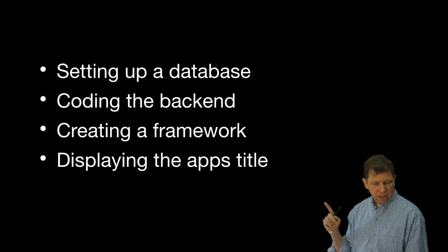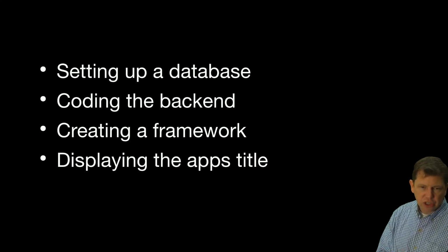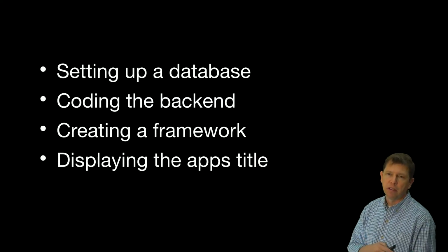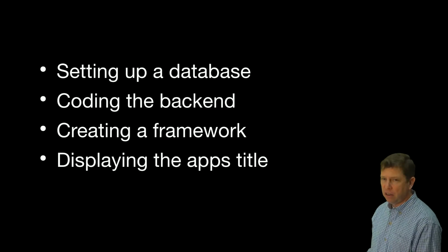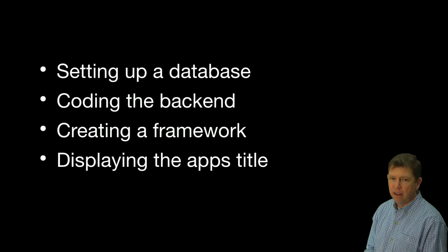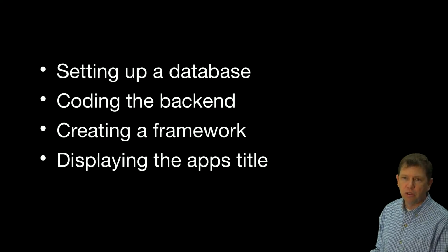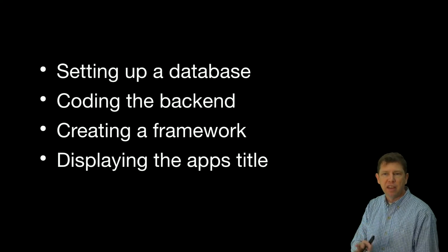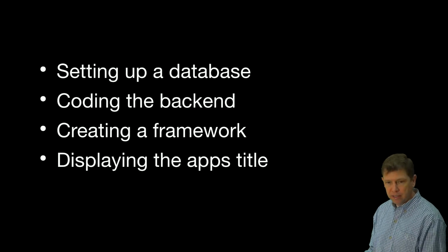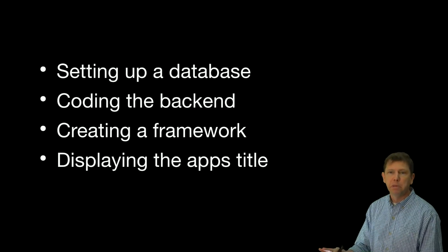I want you to look at these and think of which of these are actually going to be something that the user would perceive as progress. Setting up a database does not mean anything to the user. Coding the back end, if the user can't see it, doesn't help. Creating a framework doesn't do anything for the user that they can actually see. However, displaying the app's title on a web page they can go to does show progress. And you may also discover that no one agrees on what the app's title should be.